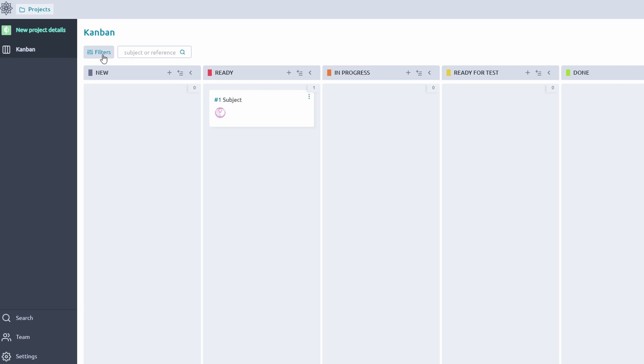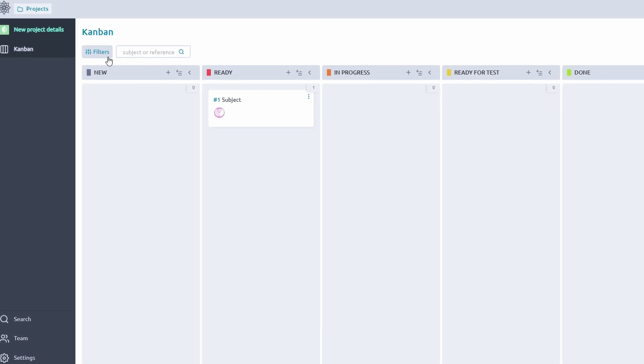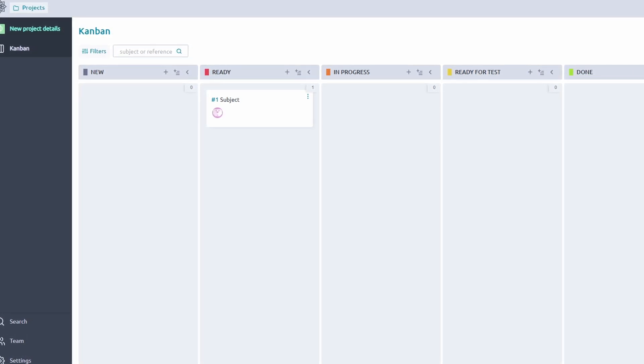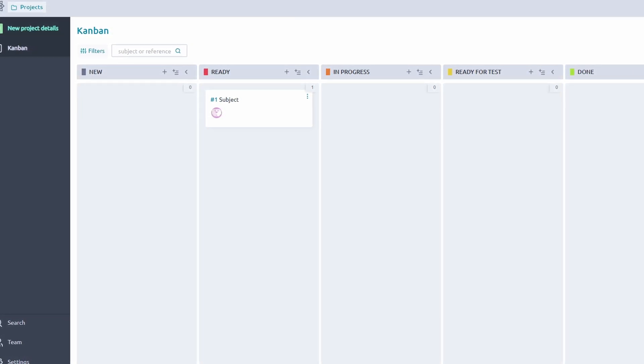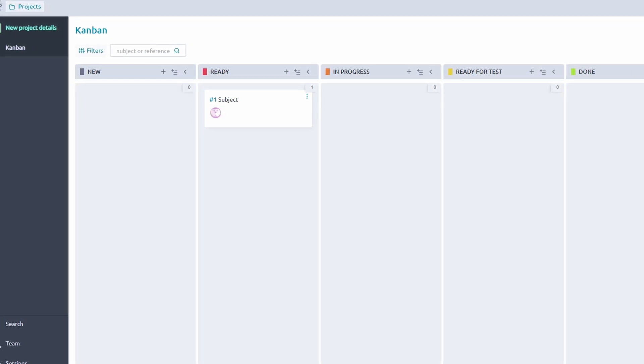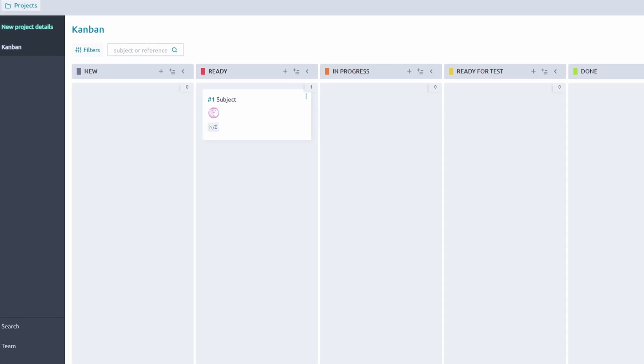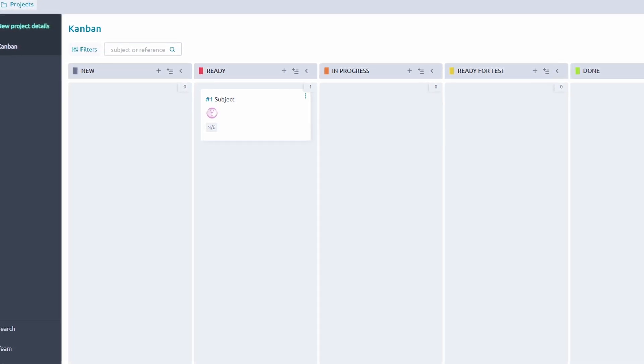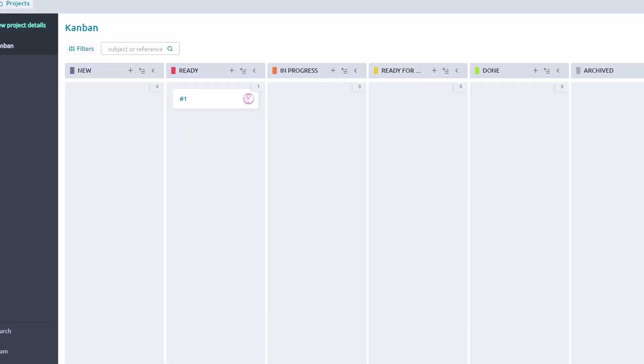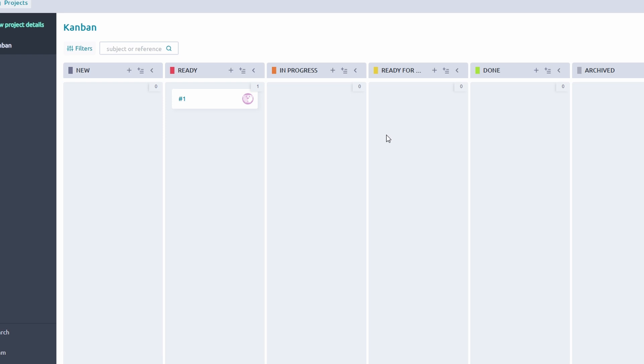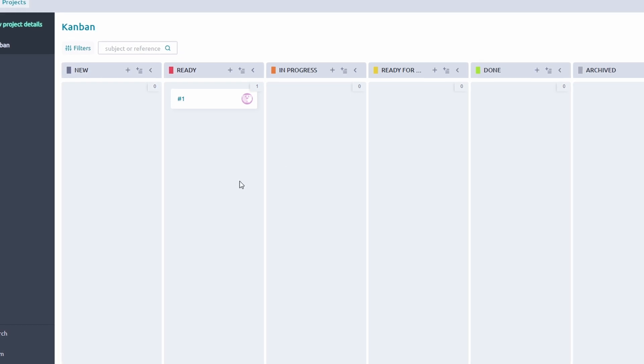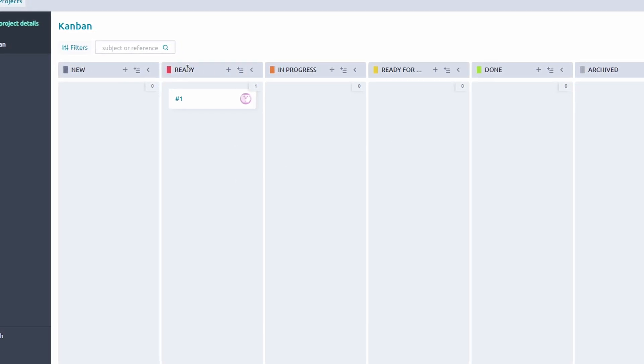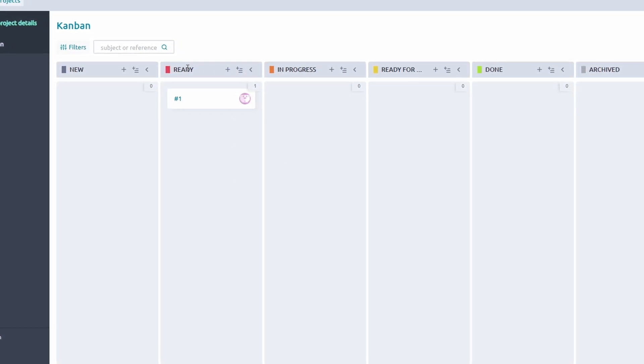Set limits on the number of tasks allowed in each column. For example, restrict the In Progress column to three tasks at a time to prevent team members from juggling too much at once.